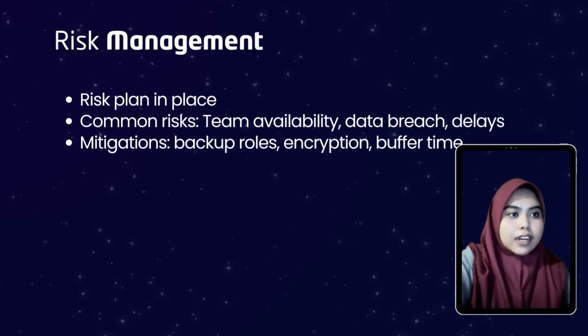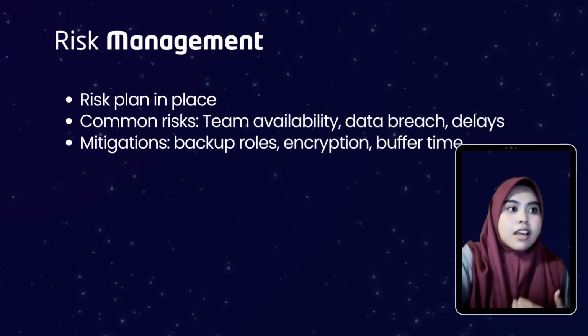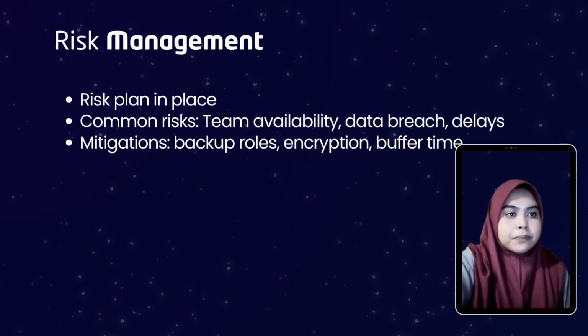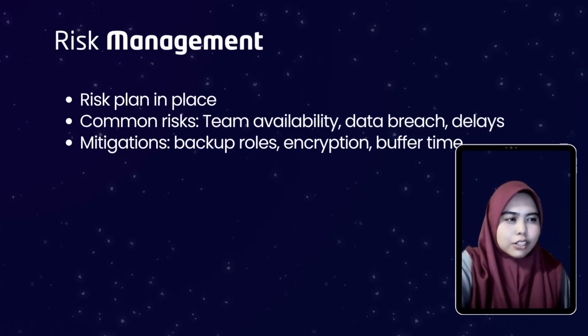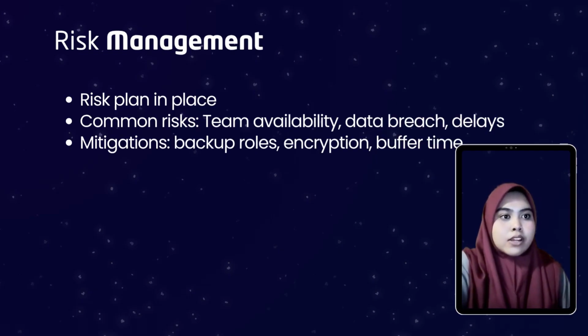Risk management was an ongoing part of our project, which is led by me, the project manager. We track risks in a risk register, assessing them by likelihood and impact, and assigning owners to manage them. So the key risks included team unavailability, which we handle with backup roles and cross training.